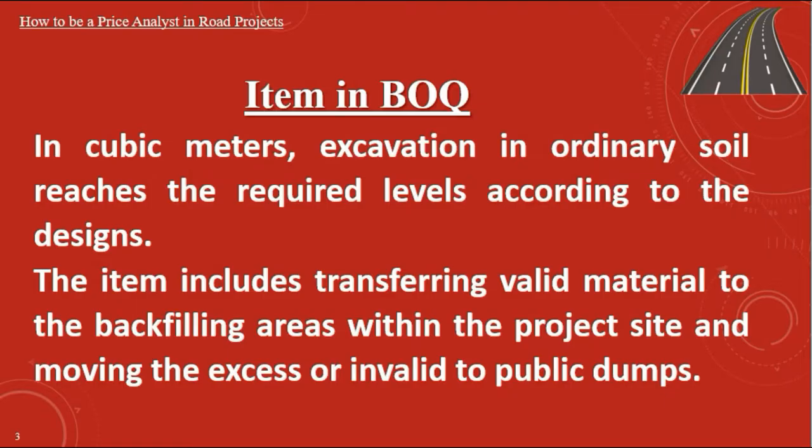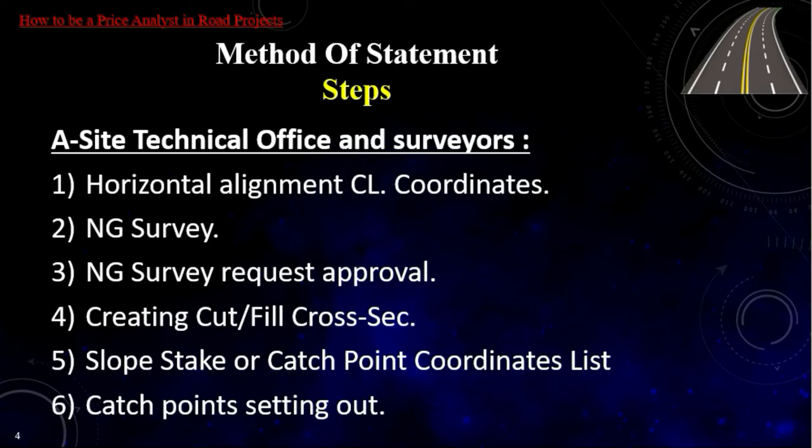Here is our first item. In cubic meters, excavation in ordinary soil reaches the required levels according to the designs. The item includes transferring valid material to the backfilling areas within the project site and moving the excess or invalid material to public dumps. Site Technical Office and Surveyors.